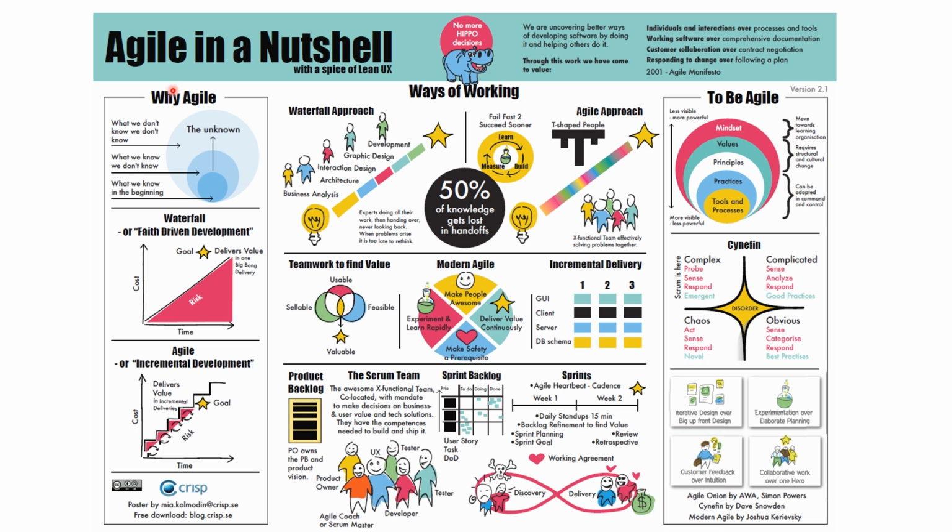So basically, why do you want to do agile and when do you want to do agile? The quick answer is, if it's very complex and very unsure what you want to achieve, then probably agile is the better one. But if it's all clear to you and you have done it many times before, a similar type of project, and you have some good estimates, then it's probably more effective to do a waterfall approach. That's the quick answer.